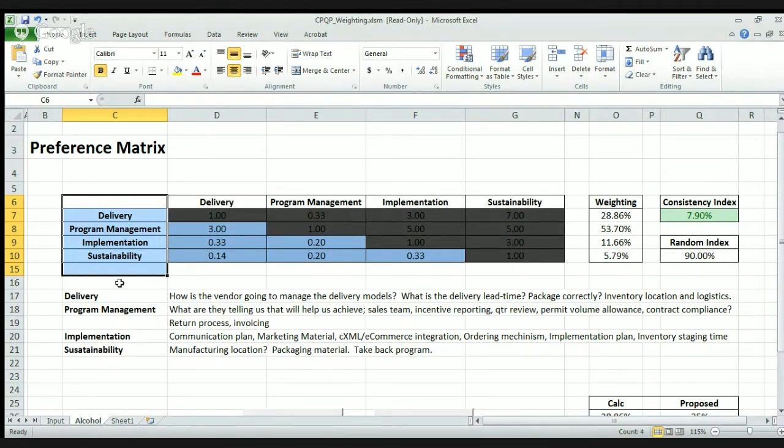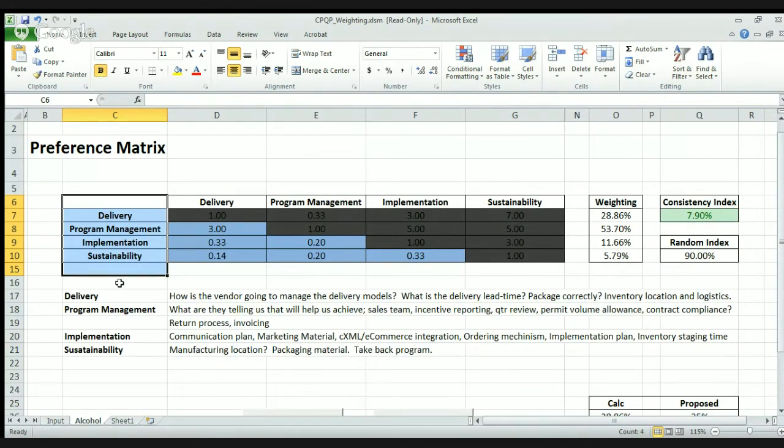But when you get to the lower impact ones, we'll just sit down, me and an analyst, or me and somebody who's expert in one of these areas, and we'll brainstorm, okay, how do we ask this question? How do we ask questions using naturally occurring scales that can then be scored by only one person? Like, how many miles does your product travel, or even, do you have a sustainability policy, right? That's binary, yes or no. Either they do or they don't. It can be scored by one person. Not everybody has to score that.